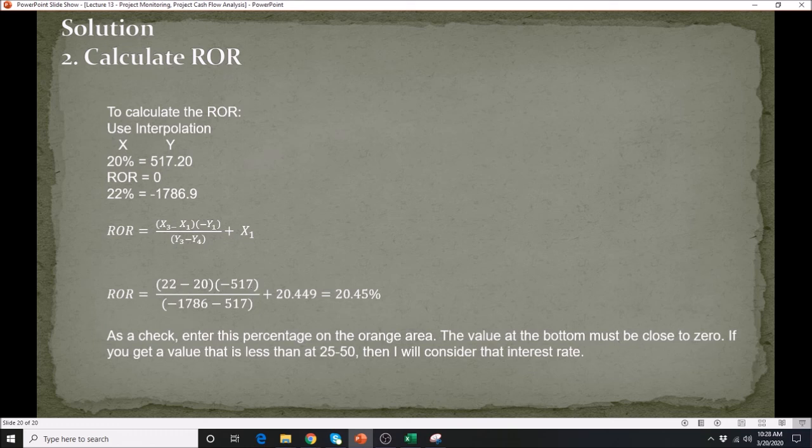This is what we call the cash flow analysis, and it is very important on the part of the general contractor to make sure that they will be able to support their field operation, with enough resources to make the operation run smoothly. And it guides you also as a project manager, or the general contractors, to see how much money you will be needing to borrow from the lending company. In addition to that, we will be able to see as well how quickly we will be able to recover the amount that we spend on this particular project.